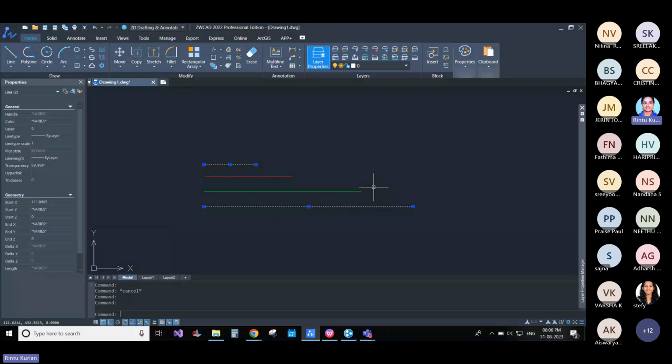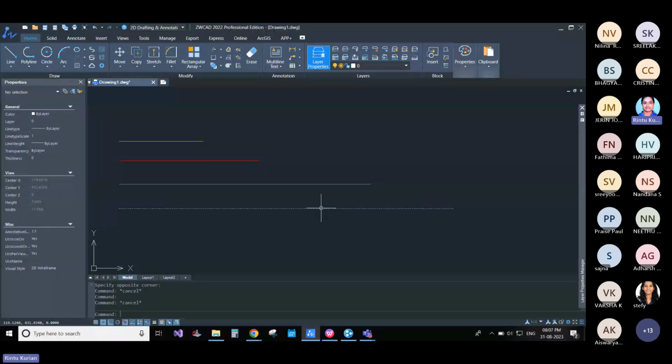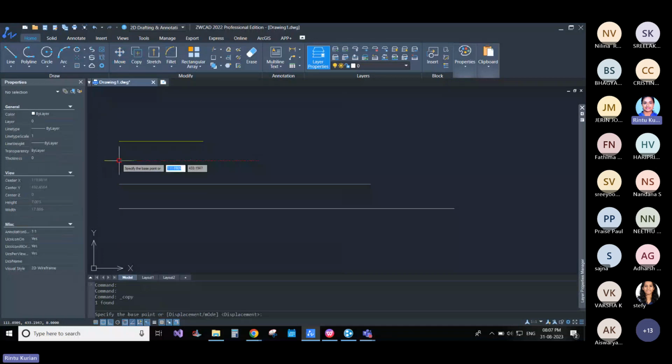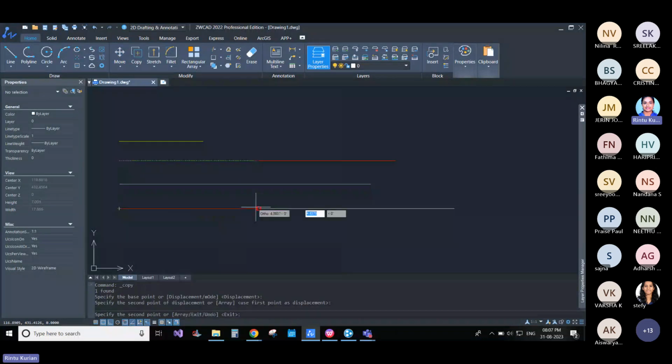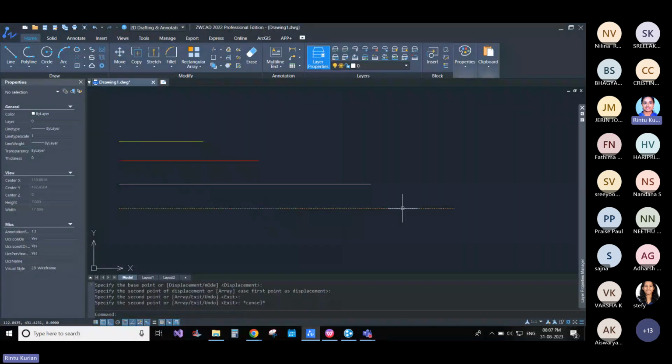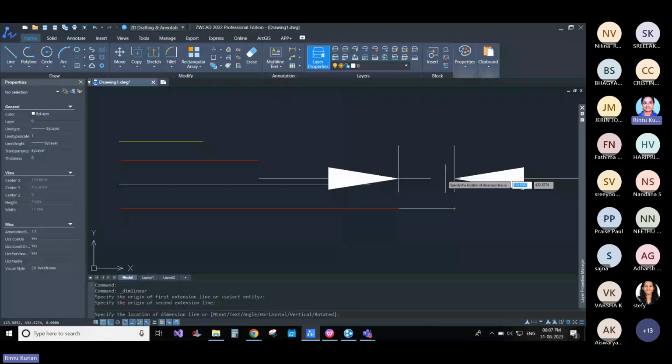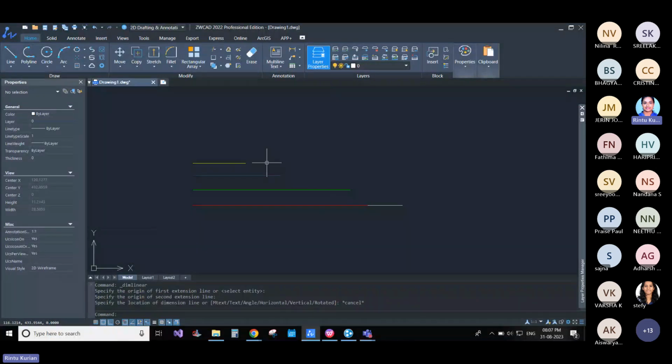If I'm cutting 2 5 meter bars from this total length, then I'll have a wastage of almost 2 meters left out. And I cannot reuse it in this particular BBS because the minimum requirement is a 3 meter bar. So all these 2 meter pieces from each.